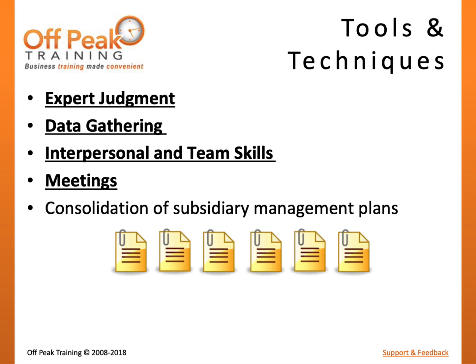There are several tools and techniques that could be used for the Develop Project Management Plan process and will be seen in many other processes we will explore. Both expert judgment and data gathering represent the determination of a project management approach by the project management team. On a small project, this may be limited to just the project manager, while on a larger project, this may include others such as technical leads, project schedulers, cost controllers, or other stakeholders that will influence the management style.